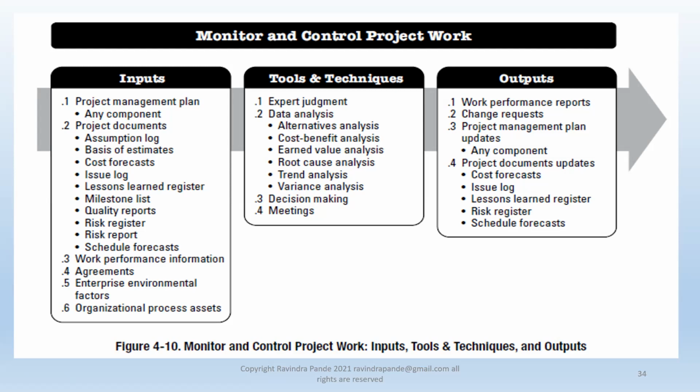If it's very minor, the cost might get borne by the project organization. But for a larger request, we might go back to the client and say, hey boss, this change request is too big, and you might need to pay extra for it. Only after this process happens do we normally include the change request in our project. We're going to consider all these scenarios in depth when we learn knowledge management.